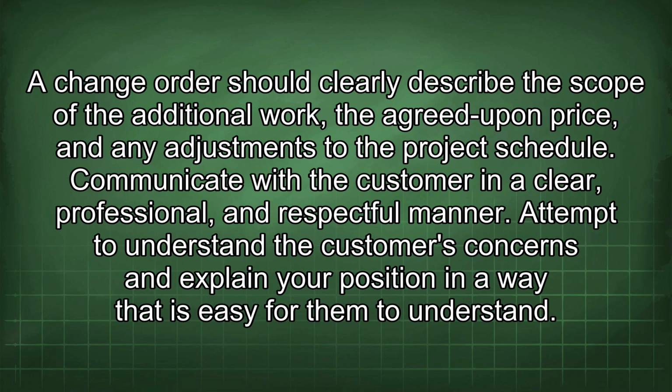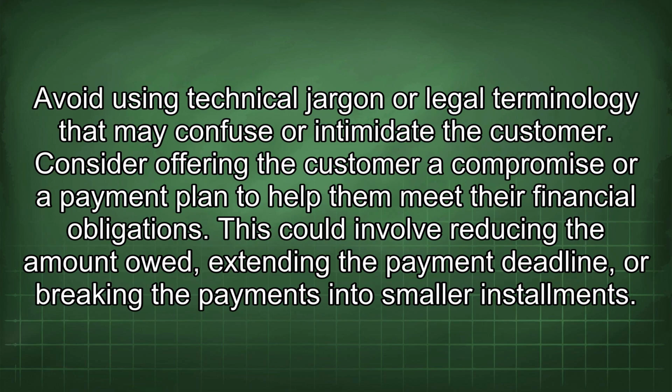A change order should clearly describe the scope of the additional work, the agreed upon price, and any adjustments to the project schedule. Communicate with the customer in a clear, professional, and respectful manner. Attempt to understand the customer's concerns and explain your position in a way that is easy for them to understand. Avoid using technical jargon or legal terminology that may confuse or intimidate the customer.